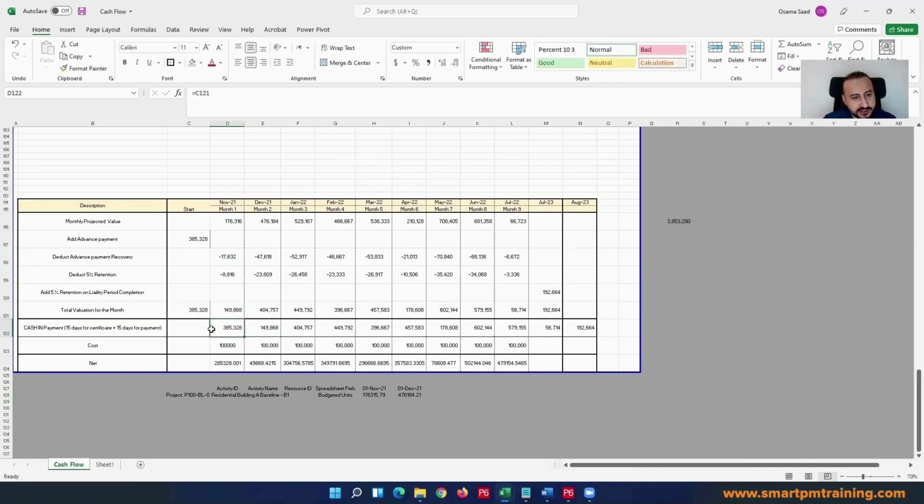Just my equations like that. Or for advance payment, it can go in the same month. So you take the advance payment, okay, you work for a month, then you submit your application. So maybe in the first month, there is no money coming into the bank account. There is a payment application, but this is the first month in the project. You submit your payment application, then 1 month after you receive it in your bank account. Yeah, I'm just giving something based on maybe some practices, but every project is different.